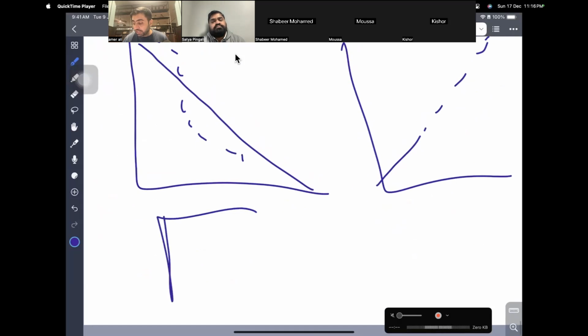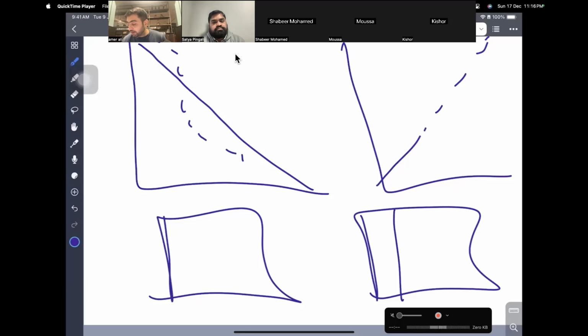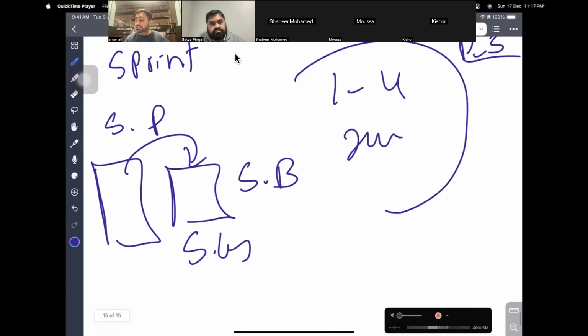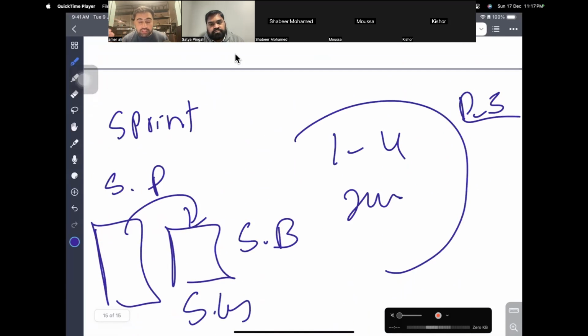Plus, we have task board that shows you the status of the work, and Kanban board that is used to find out work in progress limit, where the bottleneck is, where the problem is, how to build the flow into that. Team discuss that, and when the sprint gets over, in sprint review, according to definition of done, those user stories which are completed, team shows to the customer.